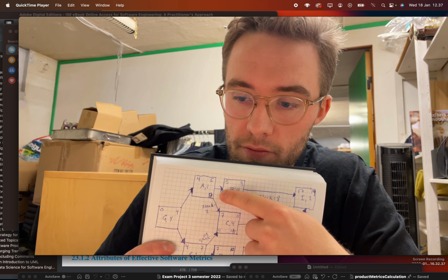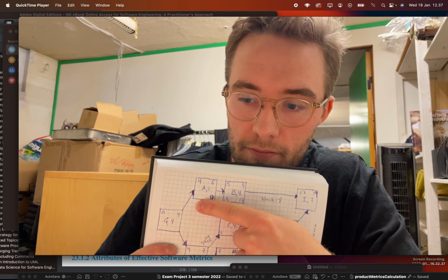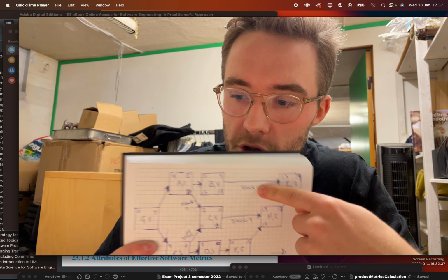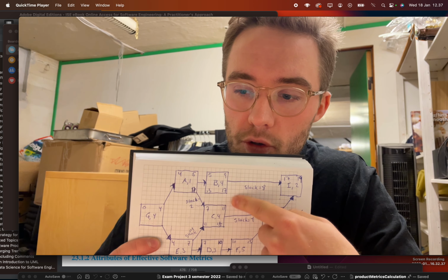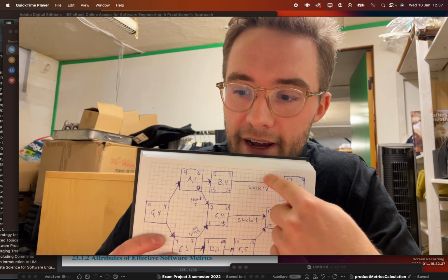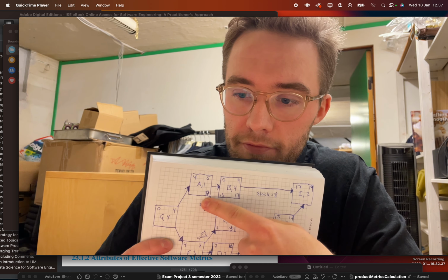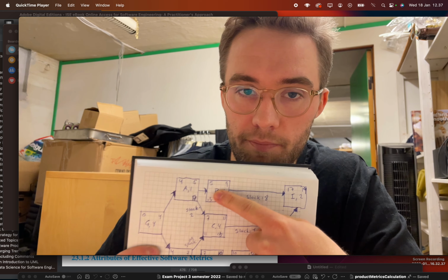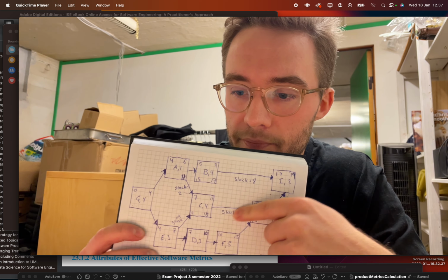Instead of just finishing this right after A, you would postpone this, so it opens up for some slack here. Therefore we say that this has a slack of 8, because you are able to postpone this from 5 to 13 actually. So the difference here is 8, the slack of 8.